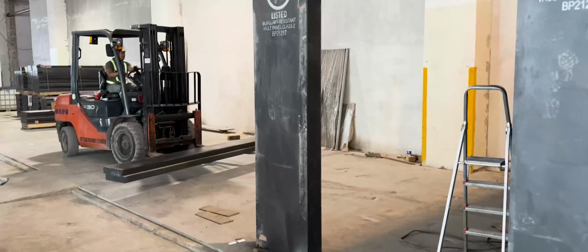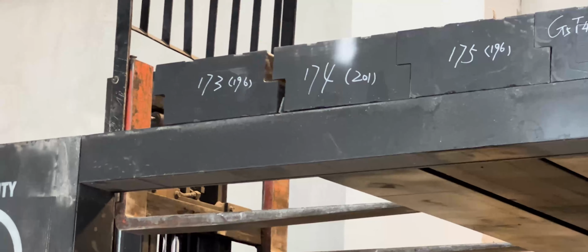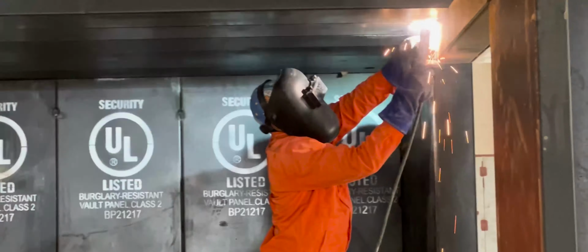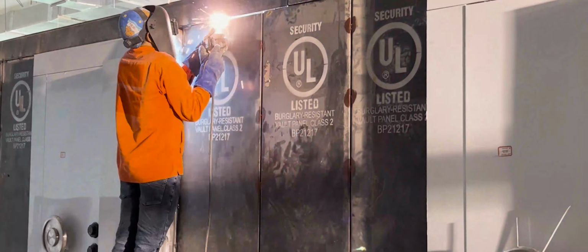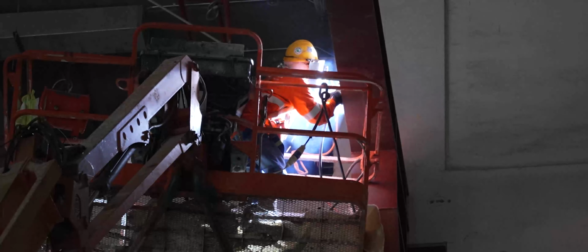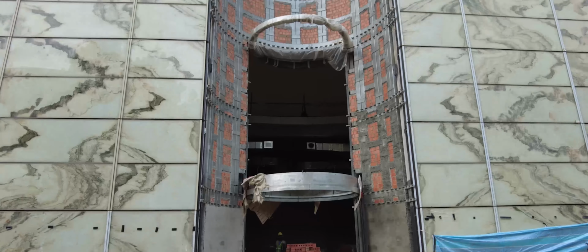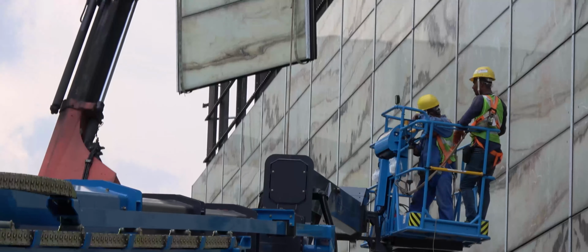So when you're building something in Singapore, there is a key milestone which is called TOP, for Temporary Occupancy Permit. And this essentially means that the government and all the governmental agencies are giving you approval for moving in. I think TOP1 is going to be a very exciting phase for everyone, ourselves inclusive, because this basically means that the building is ready to be occupied. We are ready to take in business. We are ready to welcome visitors.